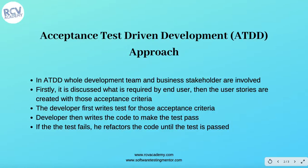In Acceptance Test Driven Development, the whole development team and business stakeholders are involved. In a Test Driven Development approach in an agile project, the testing team and developers are involved to define test cases or unit test cases. However, in ATDD it is the responsibility of the whole team along with business stakeholders to define the test cases and acceptance criteria.